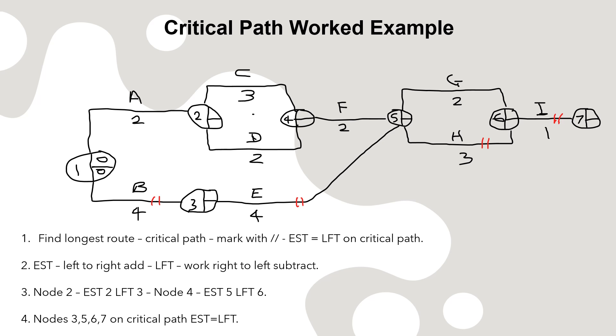Then you go via H, which is three. Eight and three is eleven, so node six will be eleven-eleven. Activity I is one, so the overall project in node seven, that will be twelve and twelve. Do not get put off by the terminology. If node three is four and four, that simply means the early start time of E, activity E, is four. The latest finish time of B is four.